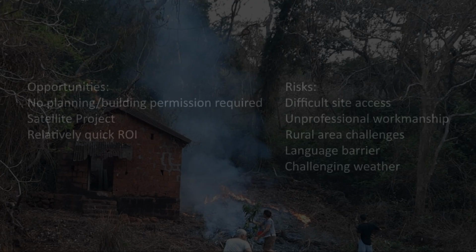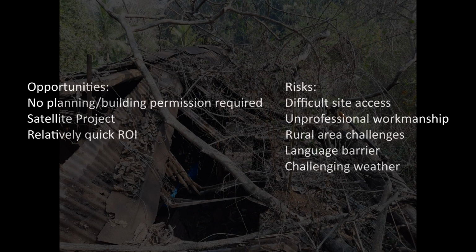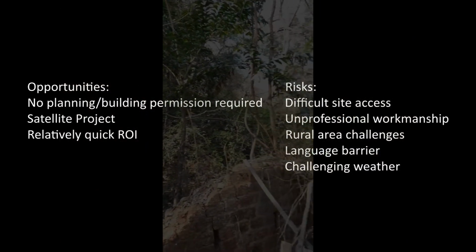So, getting into the pros and the cons now. We'll start off with the pros. Number one is that there's no planning or building permits required. And this is because I'm building within the same plot of land. I'm not making any structural changes or foundational repairs.